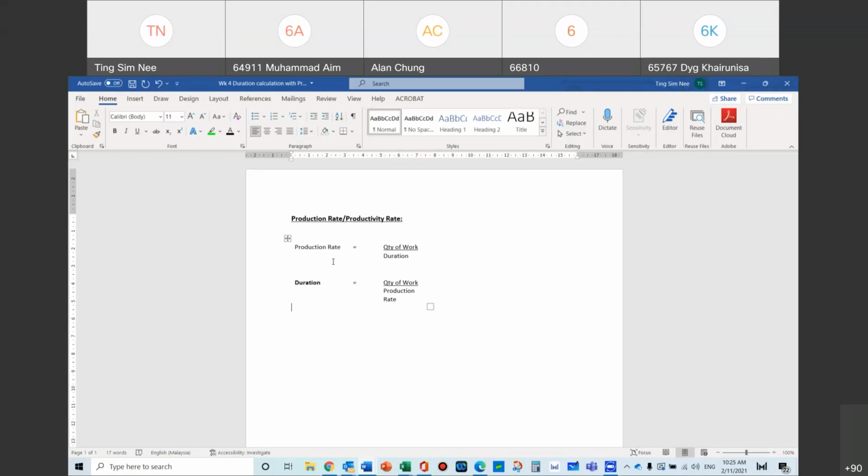So from this, you can start to say the start date of the project is 1st of November. The duration of this particular activity, which happens on the 1st of November, site clearing, will take 125 days. So you draw 1st of November plus 125 days. If you want to exclude holidays, or exclude Saturday and Sunday, you can set it in your schedule. It will be more than 125 days.